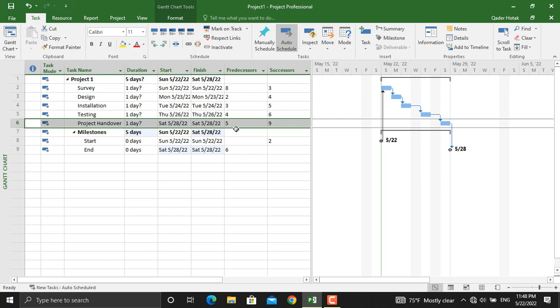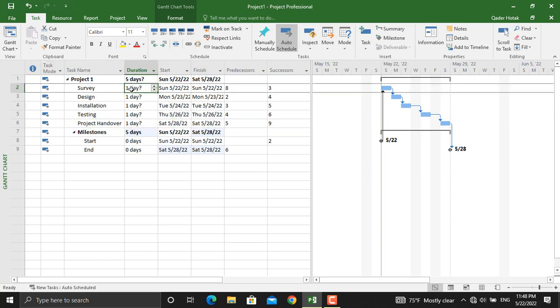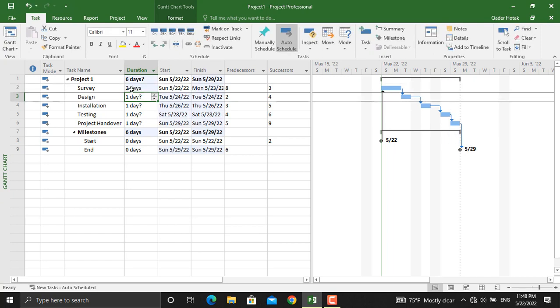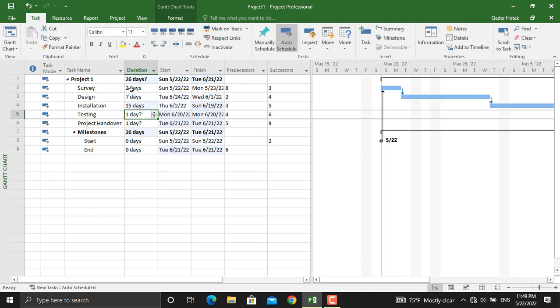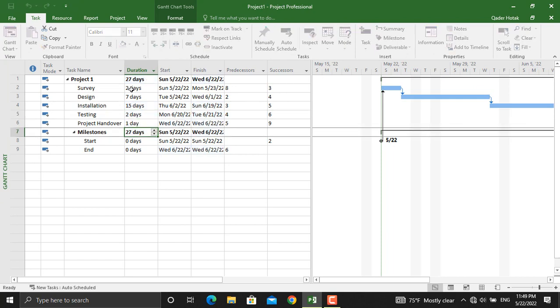Now once this is done, we will set the durations for each activity. For example, for survey, our duration will be 2 days. For design, our duration will be 7 days. For installation, our duration will be 15 working days. And for testing, our duration will be 2 days. Project handover will take 1 day.